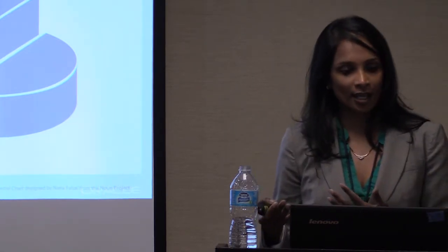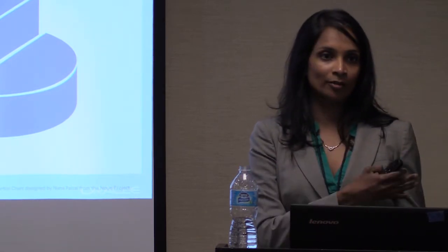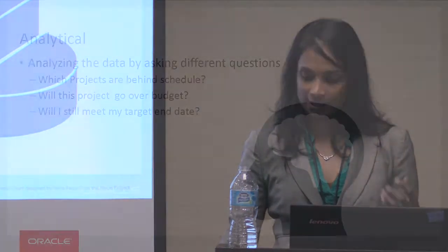You click on the project name, you can see all of the activities that are associated to that project, perhaps for that week, whatever it may be, and see which activity is causing that delay. And then you can click on the activity and be able to see why it is causing that delay. And then you can even drill down further and make that change in your system as to maybe this resource is over allocated and so they can't really finish the work on time. So maybe you need to change the resource or change the schedule a little bit, et cetera. So you can do those types of analysis and be proactive in essentially handling your business and your projects.